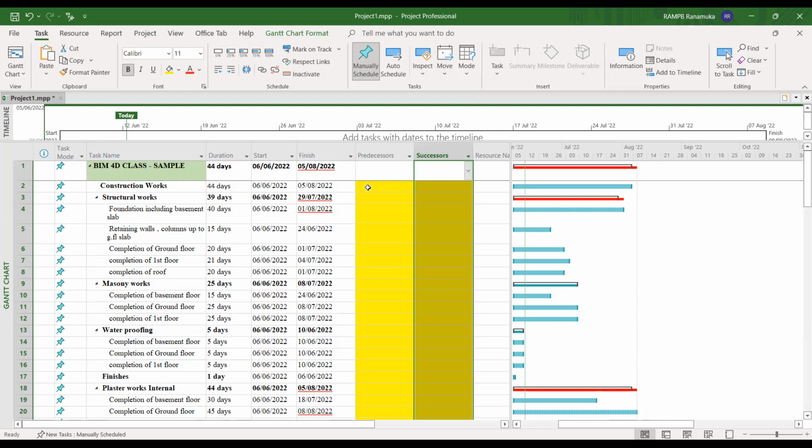For example, in concrete works, for placing ready mix or hand mix concrete, we need to complete the formwork and the reinforcement. But if you take the slab works, once you start the formwork arrangement, applying the plywood and the acro jacks, we need not wait until the whole formwork arrangement is done to start the reinforcement works.